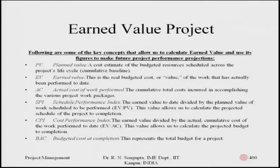The Actual Cost of Work Performed is the cumulative total cost incurred in accomplishing the various project work packages or the overall project. Comparing the first bullet — budgeted cumulative cost — with the third bullet — actual cumulative cost — you try to analyze what is the overall cost spent for the whole project versus the overall budget sanctioned, either per day, per week, per month, or per unit time.